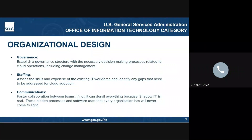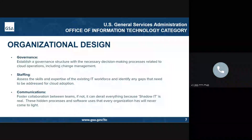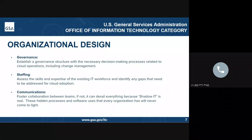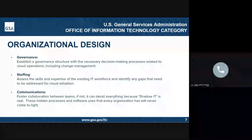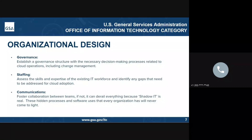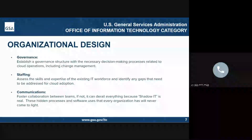When we transitioned into the cloud, physical printers in most departments were gotten rid of. We didn't even know that manual checks were done this way — manually in-house. We thought that the bank was cutting them and sending them to the address on file. This is not the case. When we moved into the cloud, this entire process broke. Because we hadn't even considered that aspect of the billing department and their need to cut physical checks to some of our employees, we didn't even consider that it was a process that even existed. This obviously created some problems for our staff. So it's a good reminder that a large-scale transition like this is a great time to address and get rid of shadow IT within an organization.